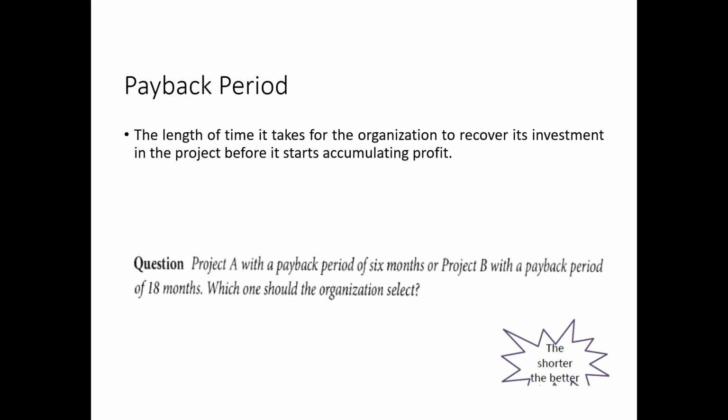So a project A with a payback period of 6 months or project B with a payback period of 18 months, which one should the organization select? Project A. Why? Because we are getting the return in 6 months. And for B, we will get the return in 18 months. So that's why we'll go for project A, right?